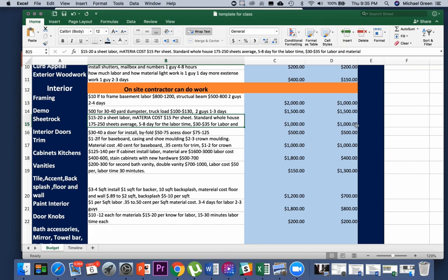If I have to do all new doors, I go $1,000. I've never really gone wrong. As a very baseline, if I just don't have time to count everything and measure everything, and I put $4,000 in for the trim and doors on a standard rehab, I'm usually pretty close. I've never really seen that to be far off. Again, that's if you need all these things. If you only need a couple doors or a little bit of trim, then you'd want to adjust this down, because we don't want to throw $2K in if we only need $500.